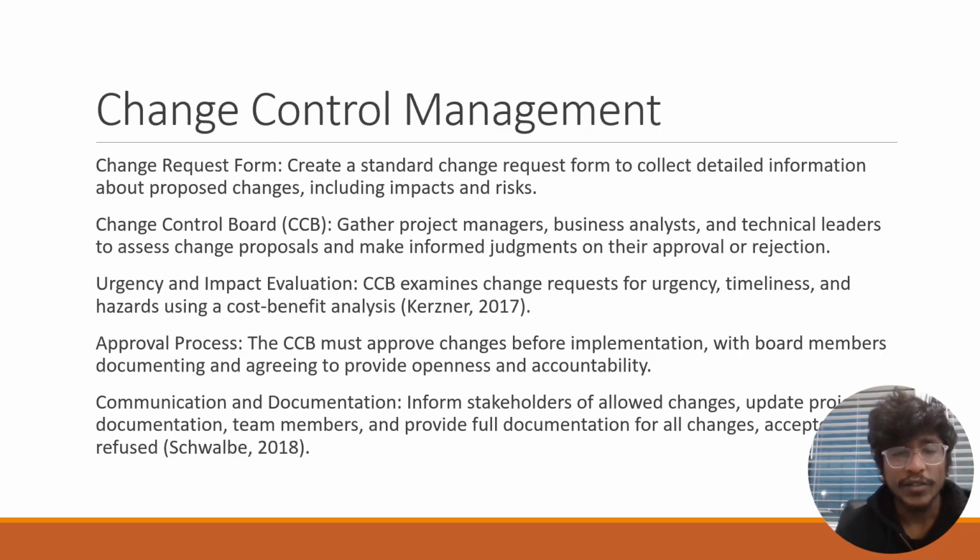Change control management. Change request form, which creates a standard change request form to collect detailed information about proposed changes, including impacts and risks. And the second one is Change Control Board, which is also known as CCB. Gathered project managers, business analysts, and technical leaders to assess change proposals and make informed judgments on their approval or rejection. And the next one is urgency and impact evaluation.